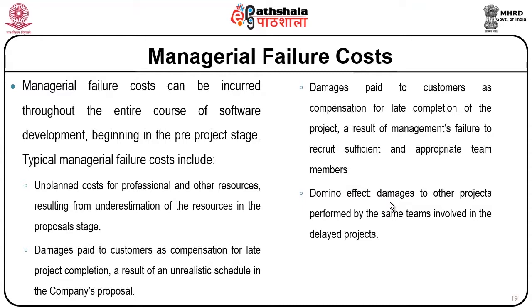Damages paid to customers as compensation for late project completion, a result of an unrealistic schedule in the company's proposal. Damages paid to customers as compensation for late completion of the project, a result of management's failure to recruit sufficient and appropriate team members.